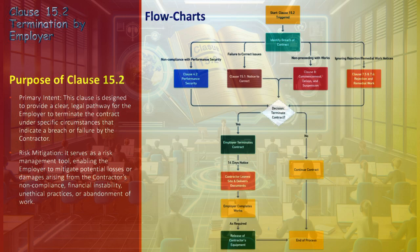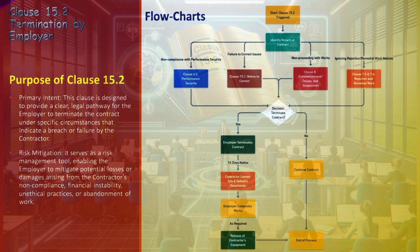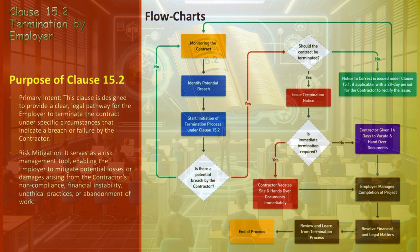The employer identifies the specific breach, which could include non-compliance with performance security, failure to correct issues, not proceeding with works, or neglecting rejection and remedial work notices. The employer then makes a critical decision on whether to terminate the contract based on the identified breach, within a reasonable timeframe ensuring due diligence and fairness. If the decision is to terminate, a 14-day notice is typically issued, after which the contractor is required to leave the site and deliver all relevant documents. If the decision is not to terminate, the contract continues as per the agreed terms.